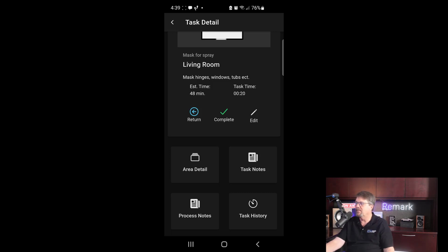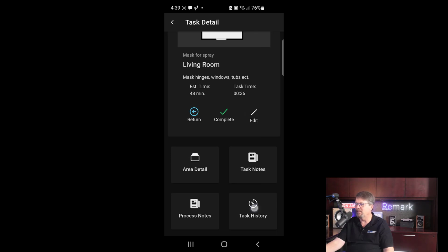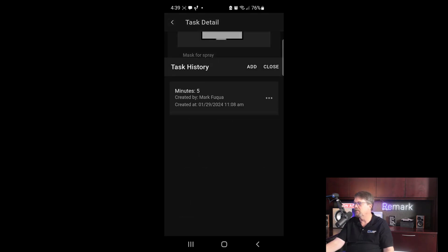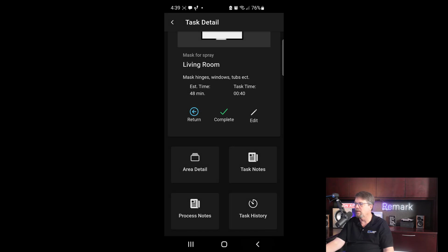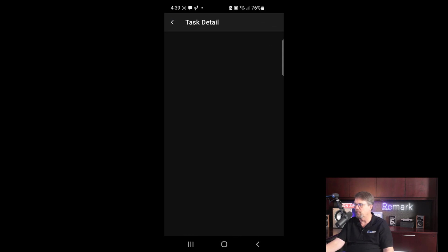Now, I envision giving guys a choice between just marking what tasks they completed during the day right from within the list, which will be the minimum requirement like this, or opening each task individually. The latter will help us get our estimated times more accurate in a faster manner. Our numbers will get better either way, but for $1 or $2 more an hour, it might be worth it to the guys to record time on each task by opening them up when they start each one.